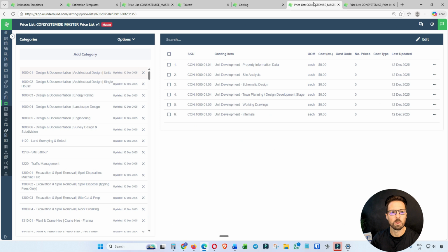So like I showed you before, you get my master price book into your account, and the idea behind this and the idea with Wunderbuild releasing the master price book feature is that you can have a price catalog that's always linked to your estimate template, and then you can plug in your own supplier rates against those master price list items, and then pick and choose what rates you want to apply to each particular estimate. So let's just do an example.